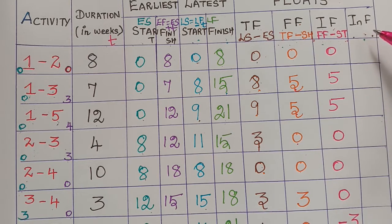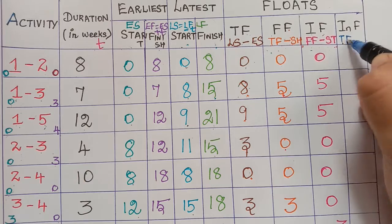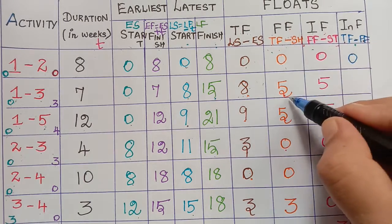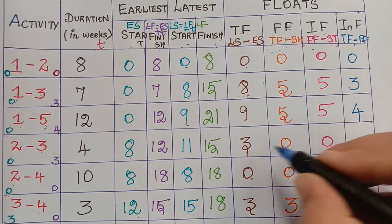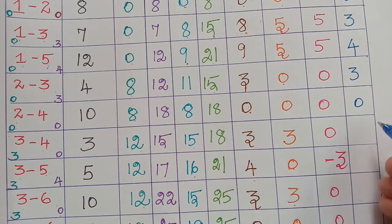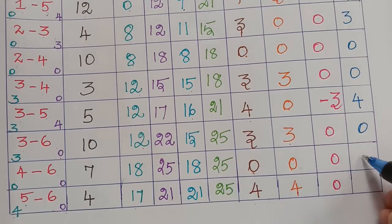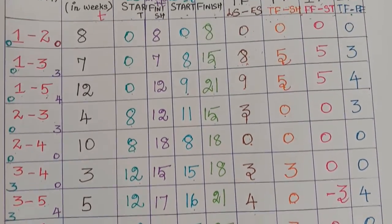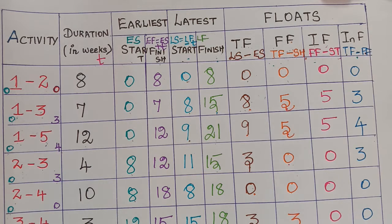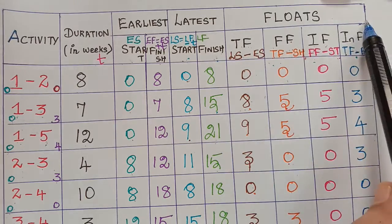Finally, interfering float — also known as interference float — equals total float minus free float. Values: 0 − 0 = 0; 8 − 5 = 3; 9 − 5 = 4; 3 − 0 = 3; 0 − 0 = 0; 3 − 3 = 0; 4 − 0 = 4; 3 − 0 = 3; 0 − 0 = 0; 4 − 4 = 0. We have now evaluated all floats as well as earliest start, earliest finish, latest start, and latest finish. In our next video we will cover the definitions of all these terms.